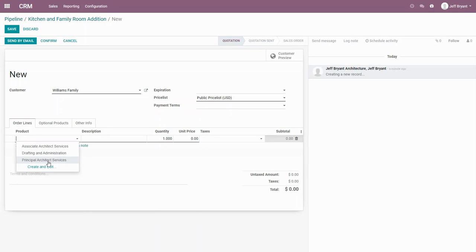And so here for a project, given a small to medium-sized firm, you might have a few different levels of staff that can get involved in a project. And so for this project, you've worked with your project manager and your estimation process and figured out, I think we might need to get a principal architect involved for 40 hours at our normal billing rate of 170.